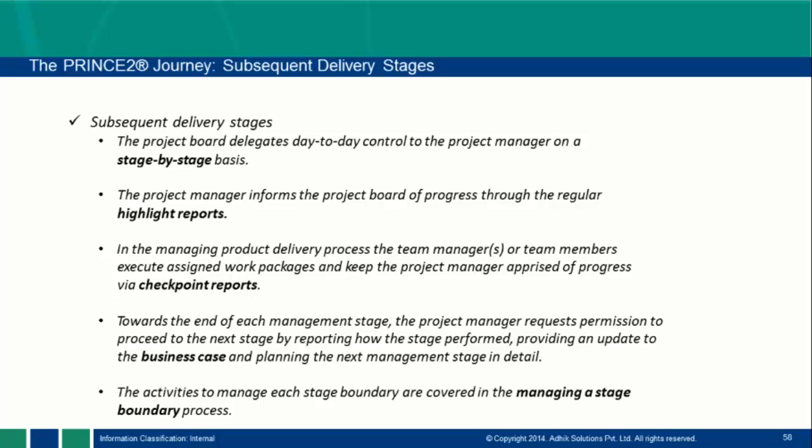First I will create the foundation, then I will do this. So those work packages, through WBS, are my work packages. And for work packages, the team manager is involved. He is working on work packages, and this report he is providing, the team manager providing to the project manager, that is the checkpoint report, the status of the work package provided by the team manager.